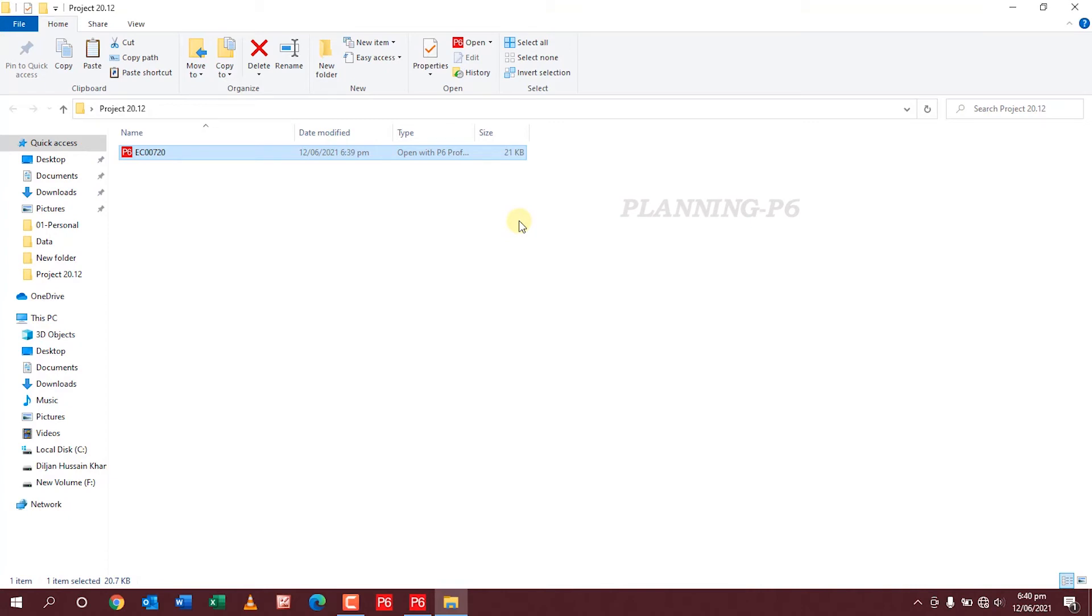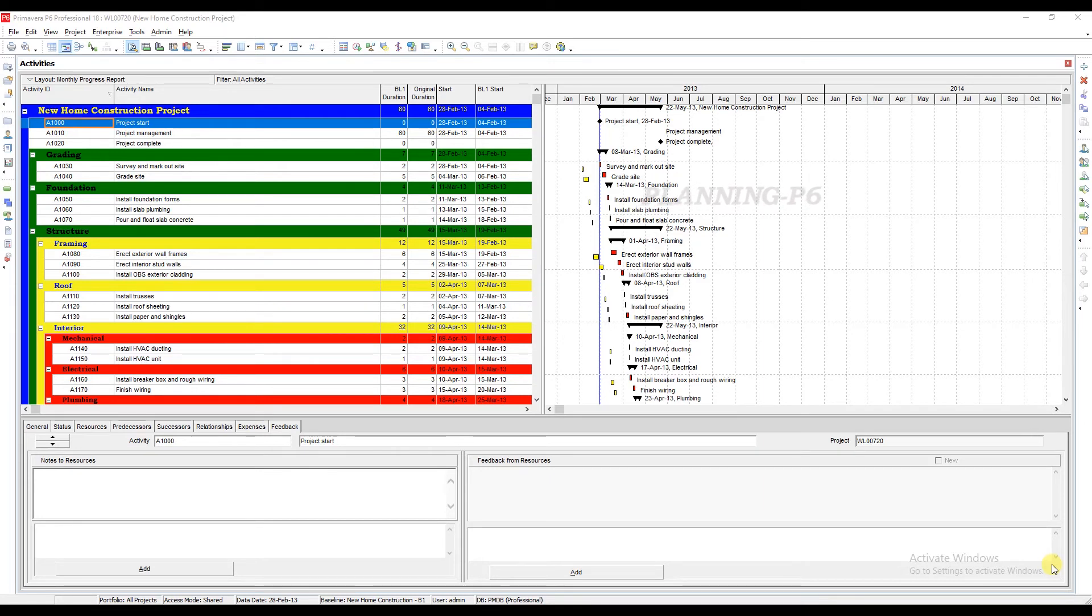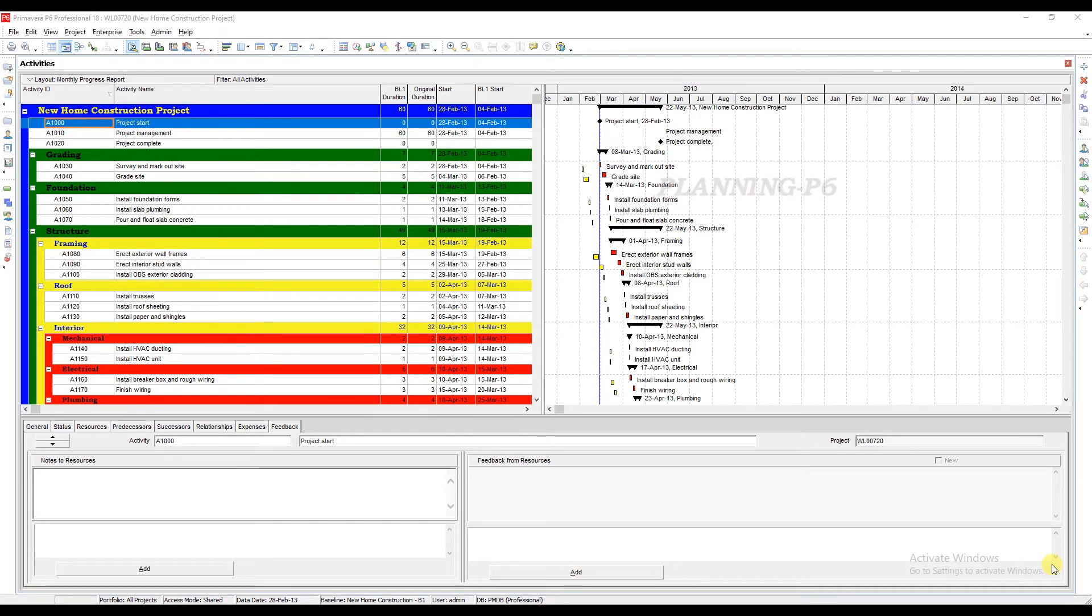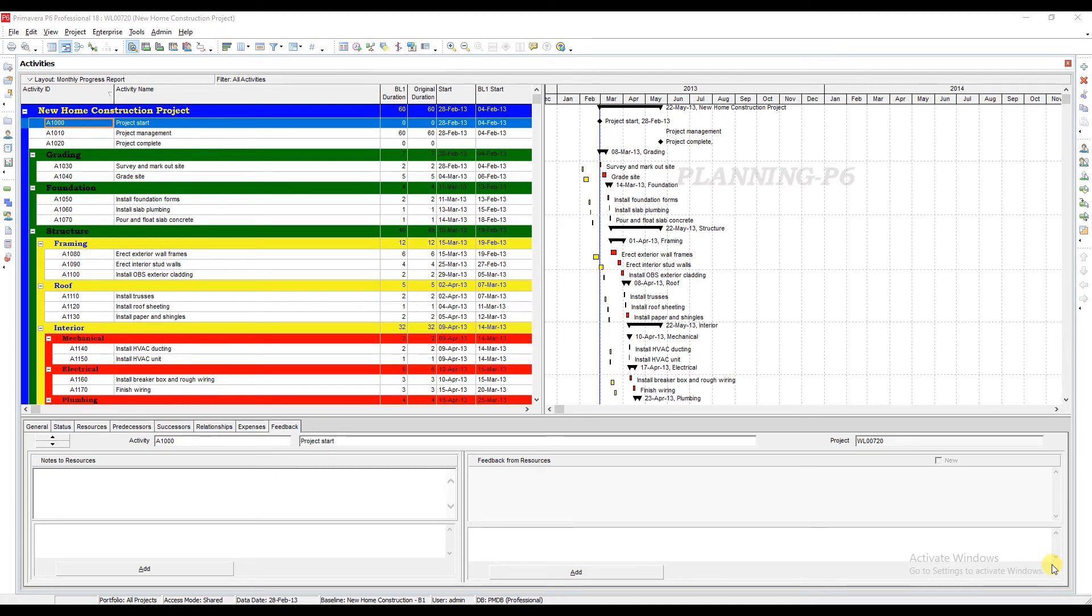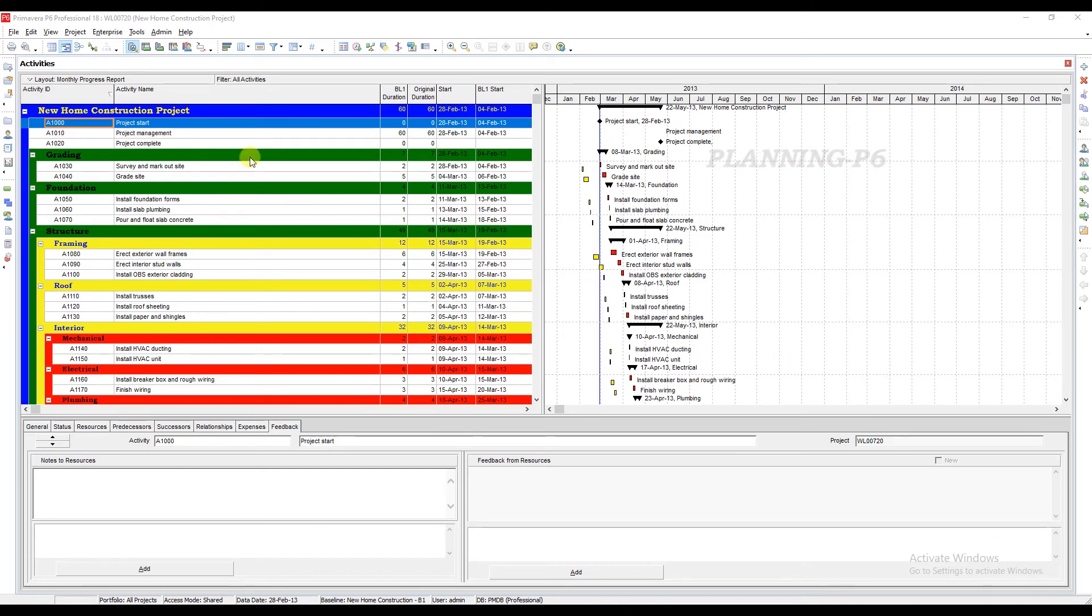Now you are able to import the XER file into your version of P6. As always, make sure to import the file from within the application itself instead of double-clicking on it. This will ensure that your file is correctly imported.